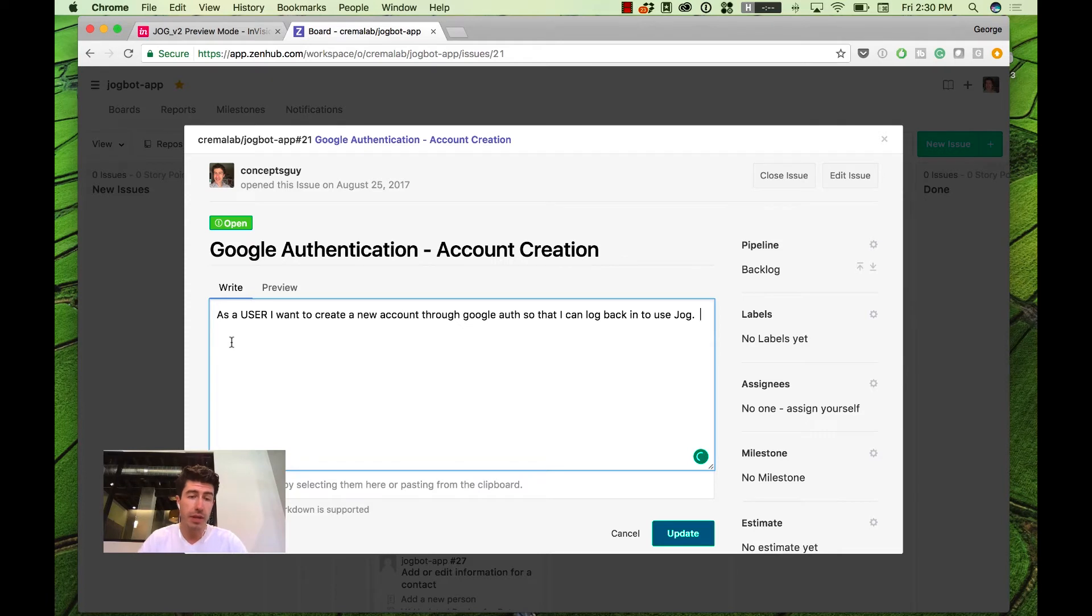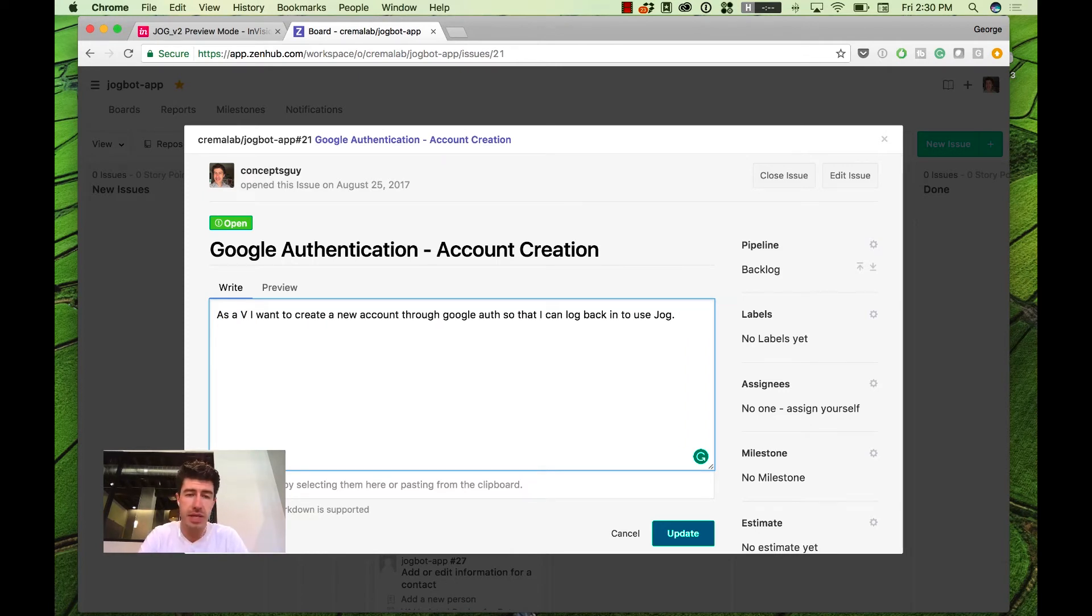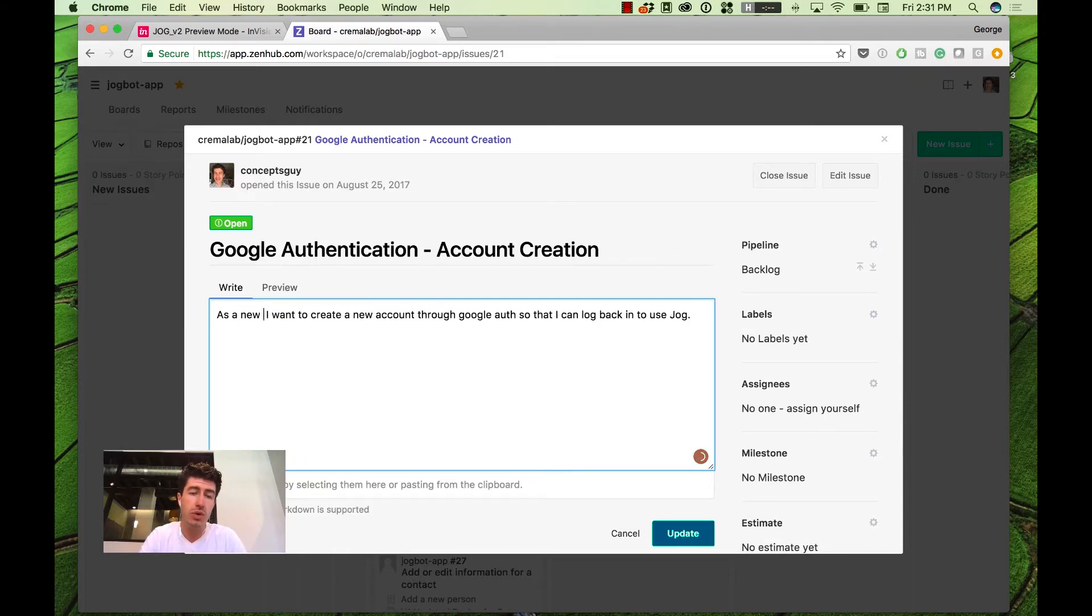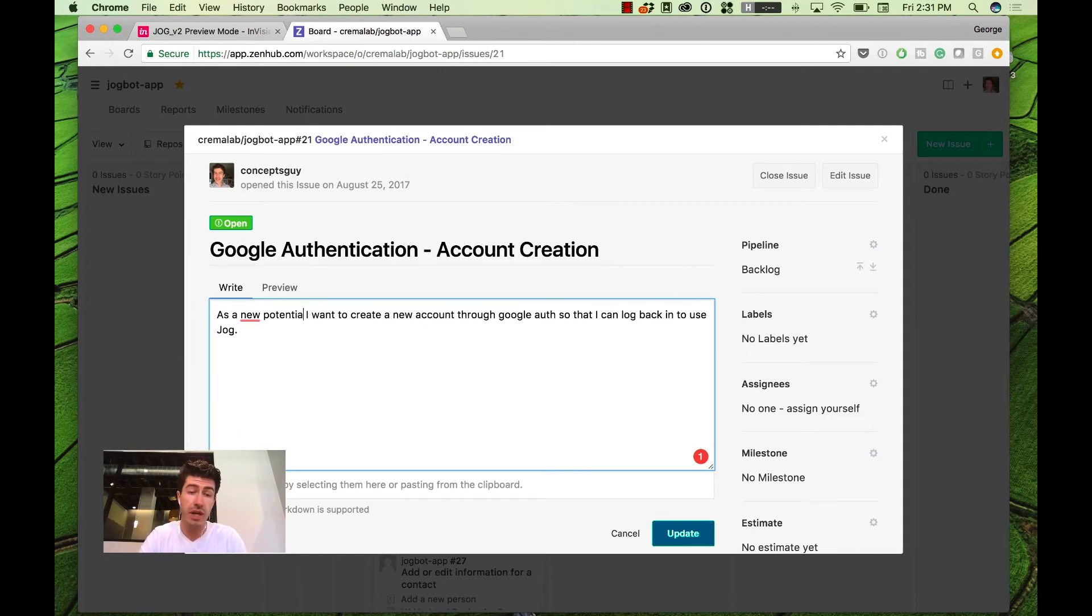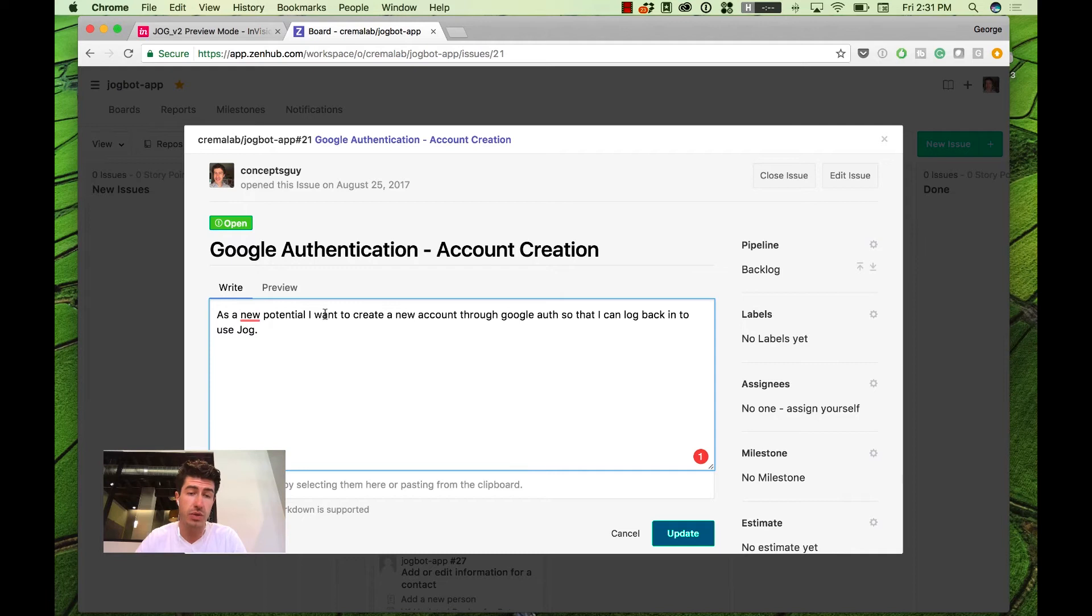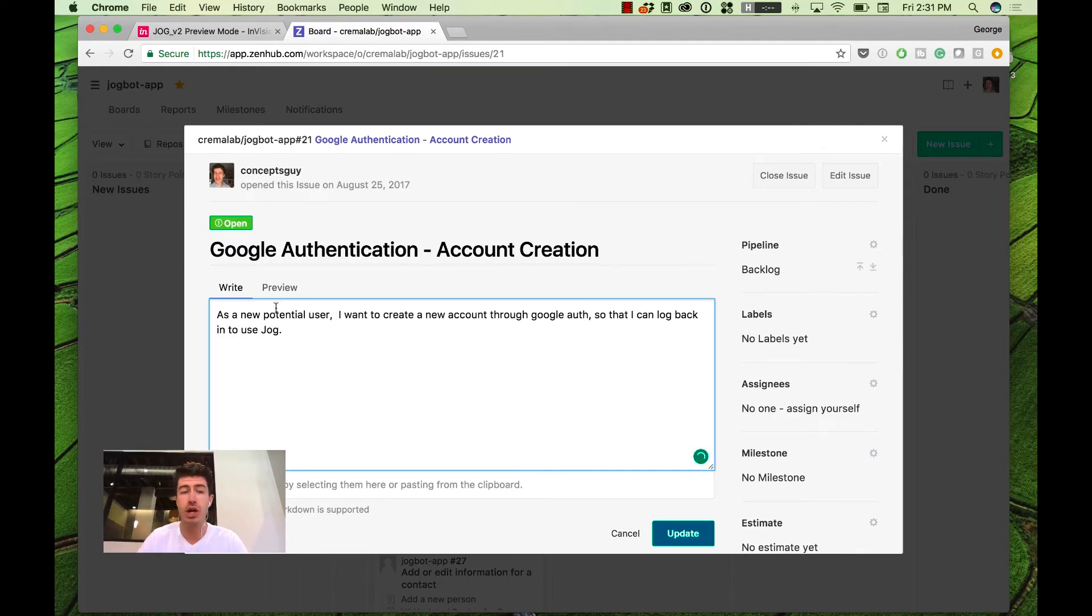The way that we break that down again is as a user, this is just anybody that's wanting to use the application. And even more specifically, this is a good thing to catch. And we would probably refine this as a team is this isn't just any user. This is a visitor. This is a new user, even potential user. They don't even have an account yet. They're checking this thing out as a new potential user. I want to create a new account through Google Auth so that I can log back in to use Jog.